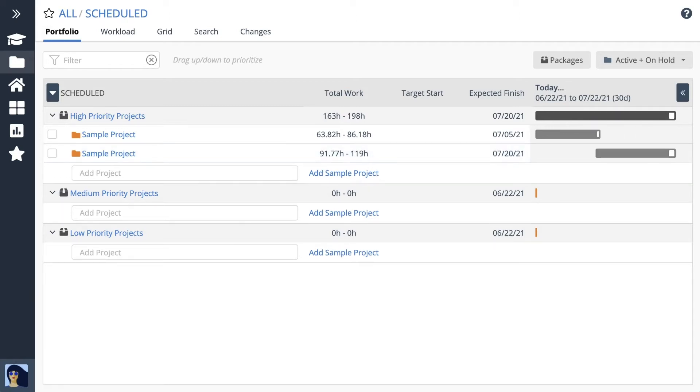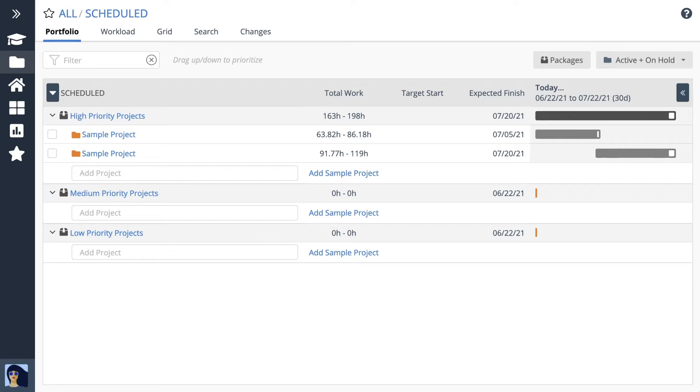Guess what? You've just experienced automatic scheduling. How'd that happen? The scheduling engine uses information from tasks inside the project folder to forecast expected start and finish dates and create the schedule bar.